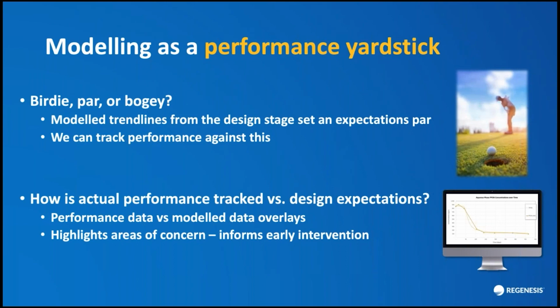And this helps us in all cases. If the fit is good, we can relax and put our attention somewhere else. We know performance at this point is on track. But if there is a discrepancy, it's quickly exposed. We can determine if it is significant and therefore a flag that this area requires attention. And from the scale and shape of the discrepancy, is it sudden, gradual, or erratic, we can gain insight into what might be the underlying cause.